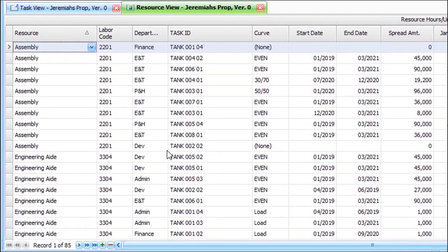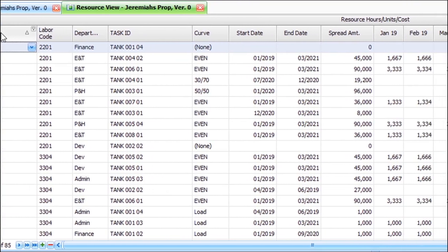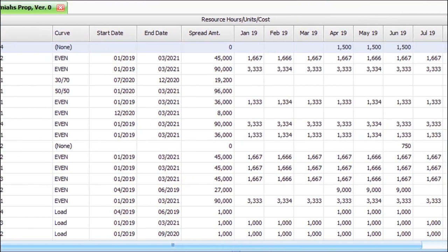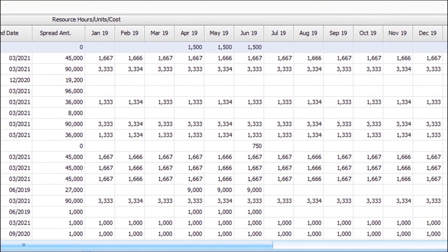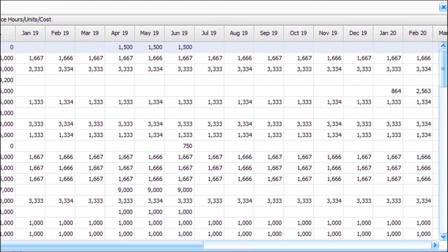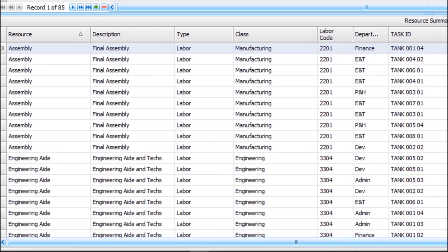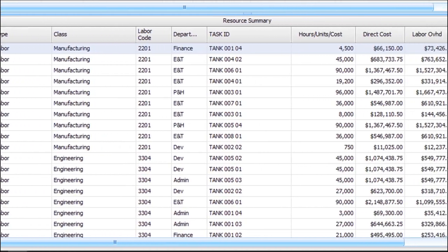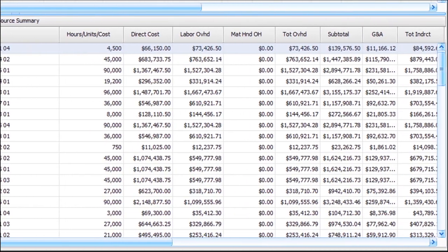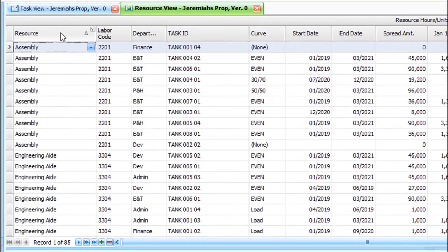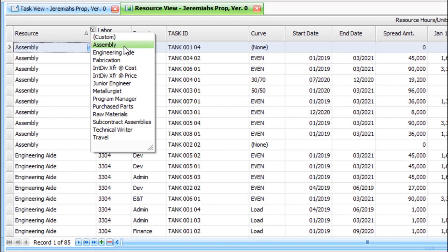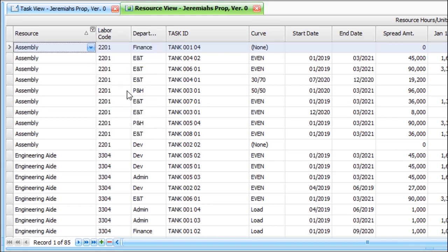The big idea behind this view is it's your Zen place for estimates, because it declutters the BOE estimates from things like tasks, WBS levels, contract line items. All of that melts away and you're left with direct estimates and their estimated times. For example, this is very helpful when you want to swap out labor categories, when they have been scattered all over the place in the task view. Simply sort by clicking on the header of the resource column, and now all your estimates are gathered from all over the place into one spot.